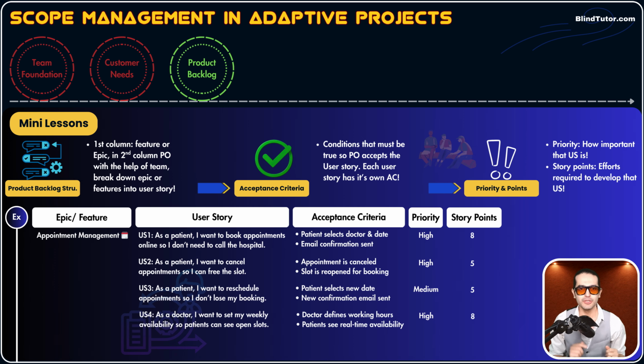Okay, for example, user story number 1 has story points of 8. User story number 2 has story points of 5. What does it mean? It means user story number 1 takes more time and effort to be completed because it has, for example, more complex technical coding and so on. Okay, now guys, let's wrap it up. This is a typical product backlog, and we know the most important document is the product backlog. And who owns the product backlog? Faster. Thank you, product owner.